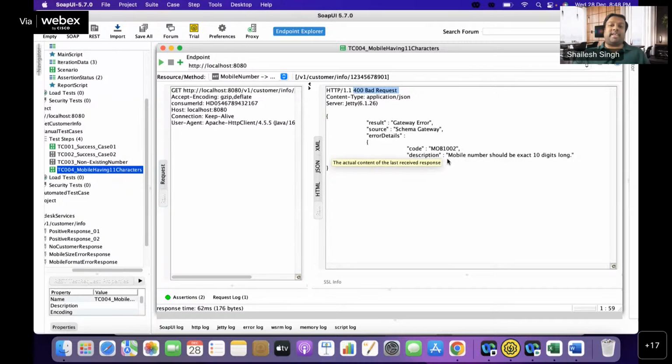Okay, don't worry that we have already reached the last day of the sprint. We cannot pass anything with defects, even if we are not able to complete what we committed in the sprint. Got it? Sometimes the developer may pressurize you that it is the last day, I will fix it after the sprint. Please ignore it for now, don't report it. But politely tell him that I cannot do that. If anything happens, I will be held responsible for this.